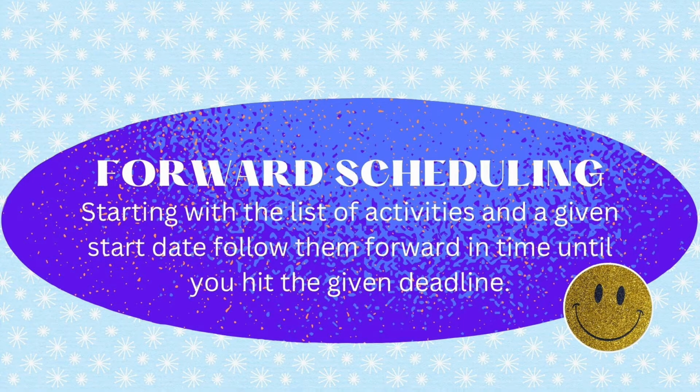Forward scheduling. Starting with the list of activities and the given start date, follow them forward in time until you hit the given deadline. Forward scheduling starts a new task on a workstation as soon as the previous one is finished.